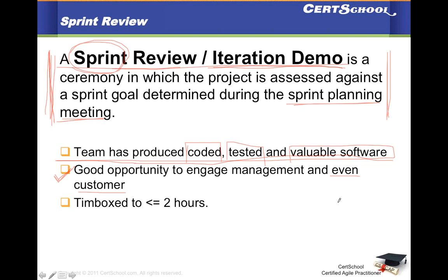It also ties up with acceptance test driven development, where you discuss first, then you develop, and then demo. So this could be that demo. Okay, sometimes teams don't do a demo for each and every story to the customer. Instead, depending on your organization culture, your team comfort level, and the engagement of the customer, you may want to do it at the end of the sprint.